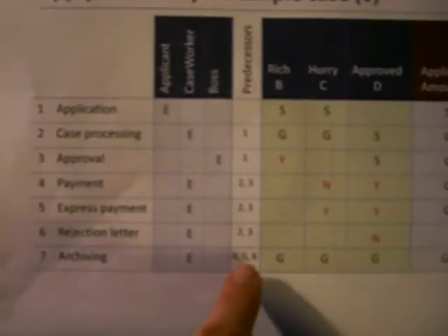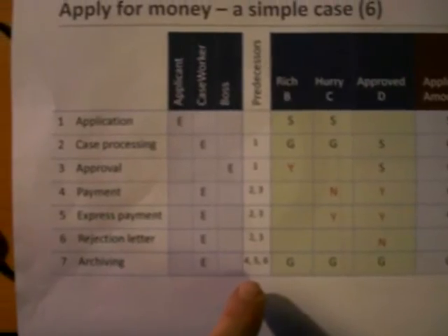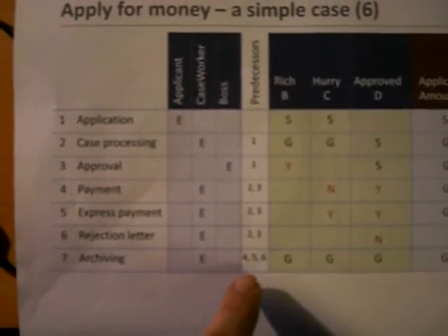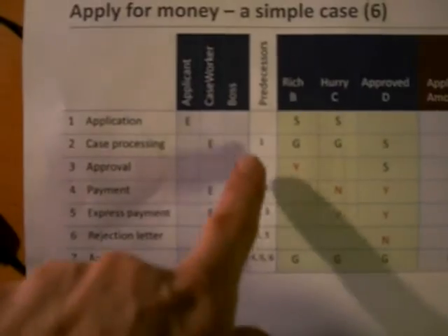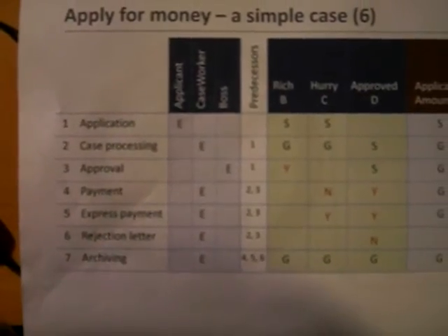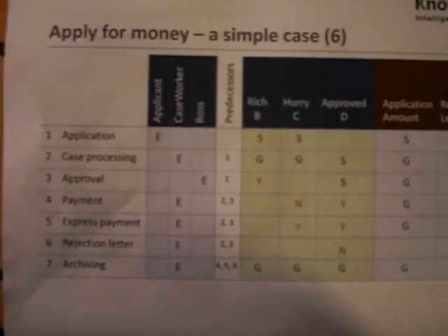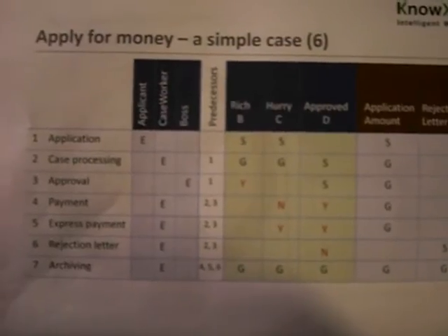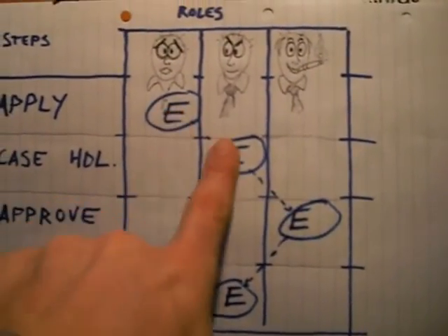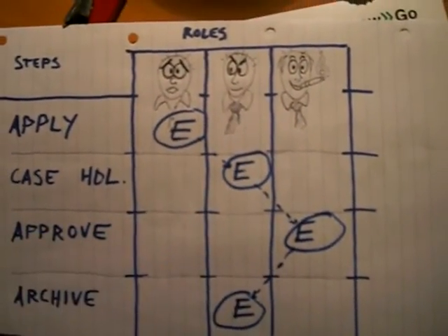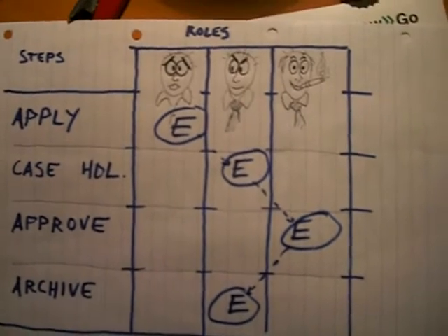Now the predecessors here, you only denote those that actually have to be there for your business logic. That means that if you don't add anything here, then everything is parallel. So we have the opportunity in the process matrix to specify only the bottlenecks that have to be there to fulfill the business logic, and not also those which would be in between the execution steps. And the flowchart therefore introduces a lot of unnecessary bottlenecks.